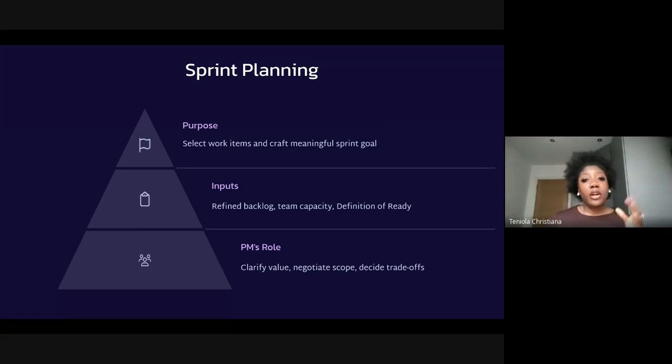So what I think a lot of people make a mistake of doing is they just dump things in the sprint and that's it, but that's not how it works. You might have an intention to completely close off a feature in a particular sprint, but often because of capacity, sometimes you have to tackle tech debt, which I'll get onto in a minute. But there are so many other competing priorities in addition to maybe a new feature or an improvement that you'd like to make to an existing feature. And as such, you have to negotiate with your team about what the scope of this particular sprint should be. Is it that we finish a particular feature, or is it just that we get halfway?